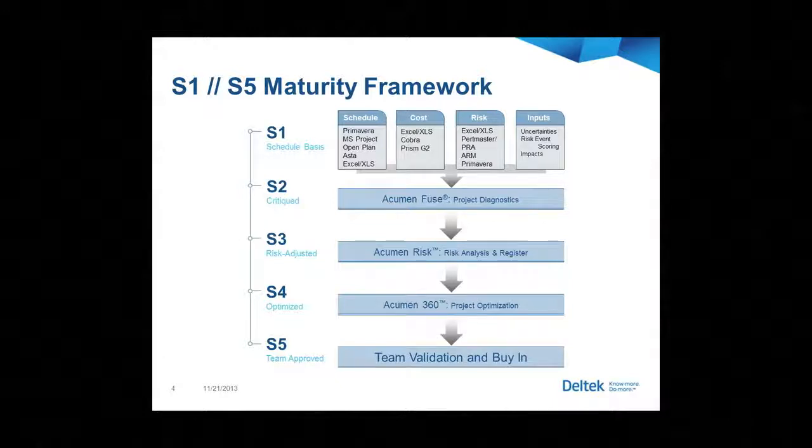Once you've gone through and done that critique and fixed any issues or potential issues in your schedule, then you can look at it in the risk modules. That's where you can import risk, or you can use the risk register that's within the tool to provide risk for both your schedule and cost, and understand how that impacts your schedule. And so you can actually get some comparisons and get a little better confidence at where to focus your time and effort for those risks and how they may potentially delay your schedule.